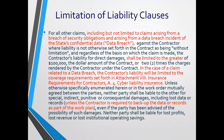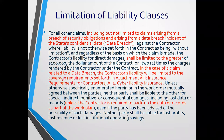Limitation of liability clauses are expanding and simply one to be careful with. If you're going through OSP and utilizing their language, they'll also be reviewing any changes the contractor requests. We're seeing these a lot on technology-type contracts and things in the cyber domain. In some cases, they're trying to limit their liability to an insurance policy — language like 'in the case of a claim related to a data breach, the contractor's liability will be limited to the coverage requirements set forth.' That's something to be aware of and look for.